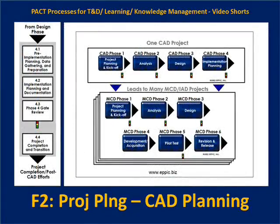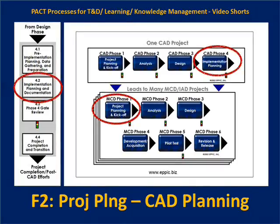One CAD project with all of its gaps prioritized in the fourth phase leads to many downstream MCD and IED efforts — modular curriculum development and acquisition, and instructional activity development and acquisition. In phase four, sub-phase 4.2, the implementation planning and documentation is reviewed in the gate review meeting and approved or modified by the project steering team, which dictates what kinds of projects we're going to have downstream in MCD and IED.